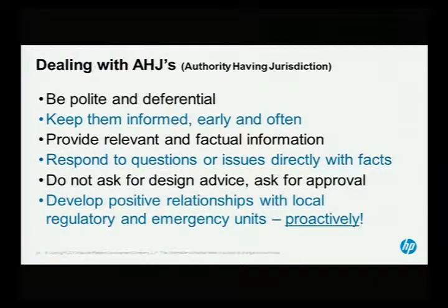Ask for approval. Based on this in the code book, based on the local codes as adopted, based on the standards that we're following in NFPA 70, 75, 76, and based on the local code with this paragraph, this is what we're trying to do. Okay, then you'll come in and you walk them through.